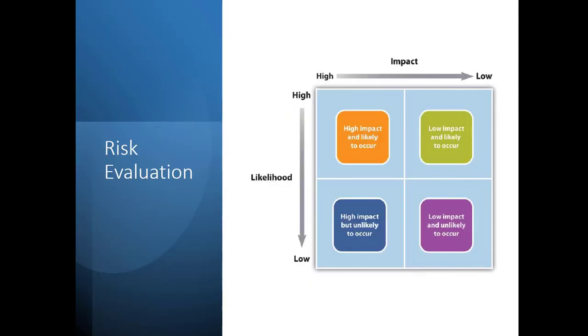After the potential risks have been identified, the project team then evaluates each risk based on the probability that a risk event will occur and the potential loss associated with it. Not all risks are equal. Some risk events are more likely to happen than others, and the cost of a risk can vary greatly. Evaluating the risk for probability of occurrence and the severity or the potential losses to the project is the next step in the risk management process.